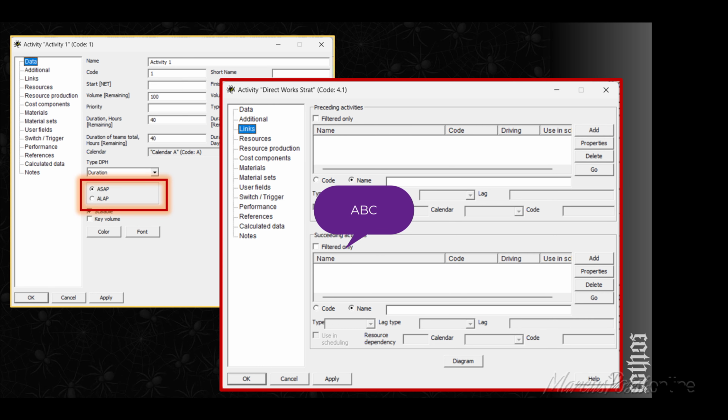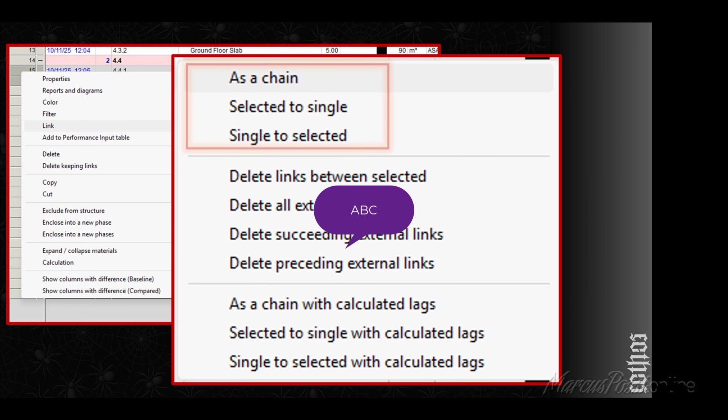Today, we have to talk about as late as possible, and try to schedule everything as soon as possible. I don't want to pay somebody to make things for me as late as possible. But for you, that are executors, it's your problem. As late as possible takes off any floats, takes off any time advantage you could have. All the risks will be due to your activity. But anyway, it's your choice. Try always to plan or schedule everything as soon as possible.